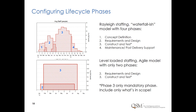All product development projects perform the same basic activities. The rate at which people are applied to the project is modeled using the Rayleigh statistical curve. SLIM can be configured for waterfall, agile, or hybrid development environments.